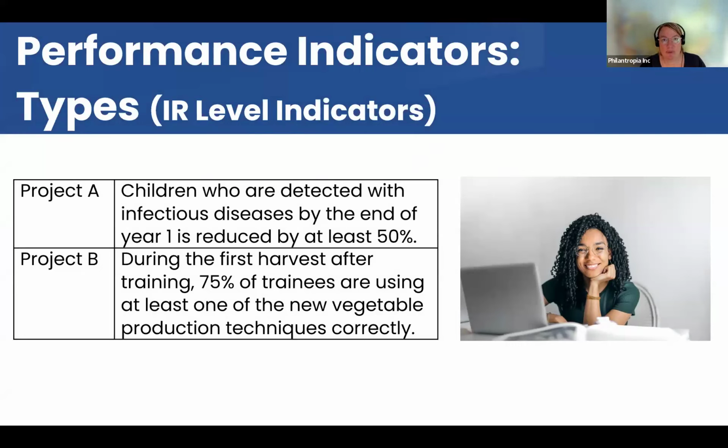So this is milestone reporting, but these are the changes in the target group, not in the population, not in a society that was the level above that, but in the target group that you want to achieve specifically with numbers and time bound, so that you can say, yes, we achieved that, or no, we didn't. And then know why, what's the issue, and then solve that issue. So this gives you a lot of insight into how your project is working and how it's going.